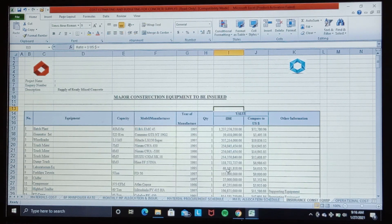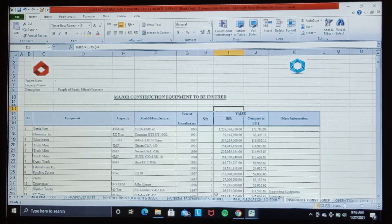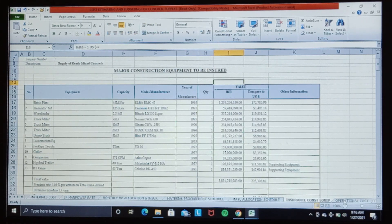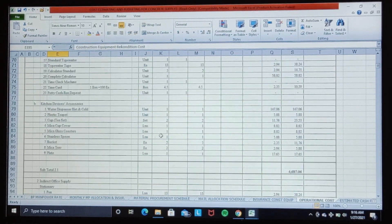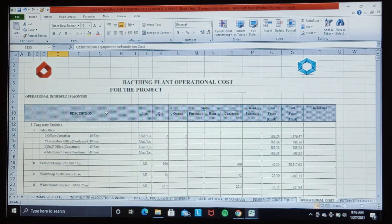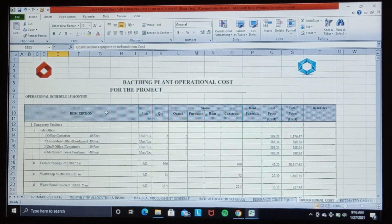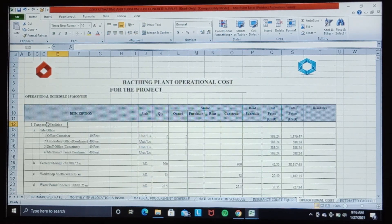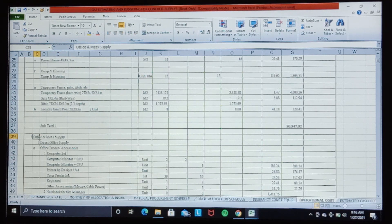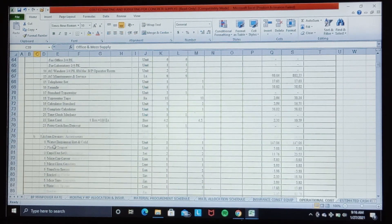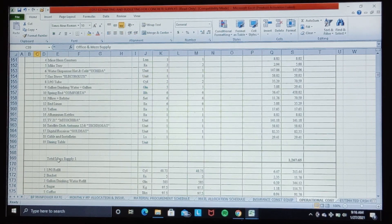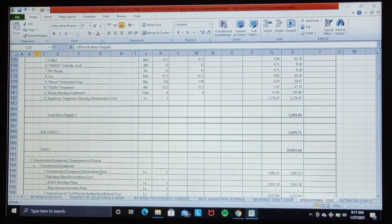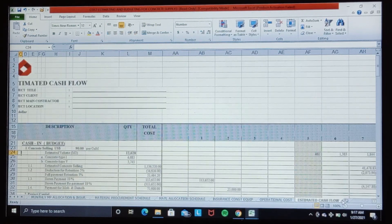Next we calculate the project operational cost. It has the preparation cost for construction, temporary facilities, office and mass supply, and the other operational costs.